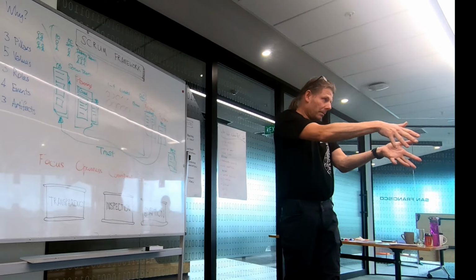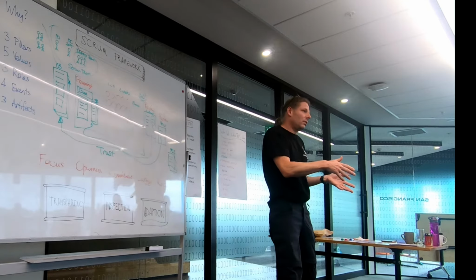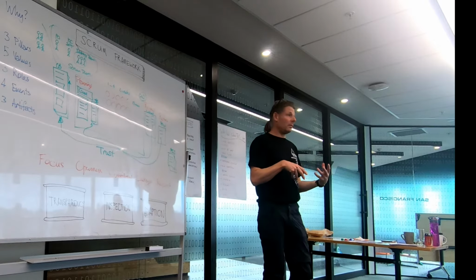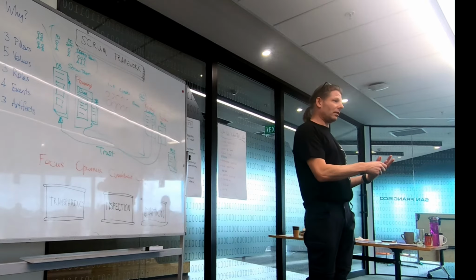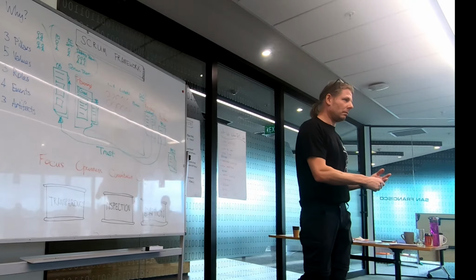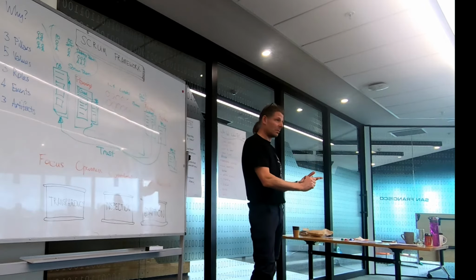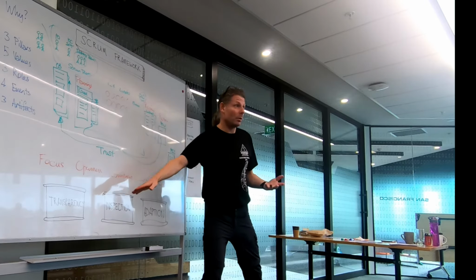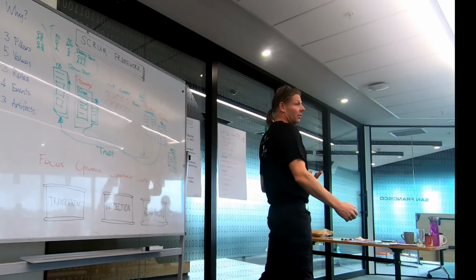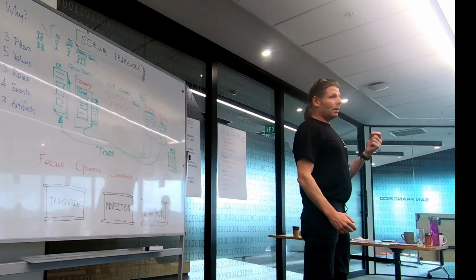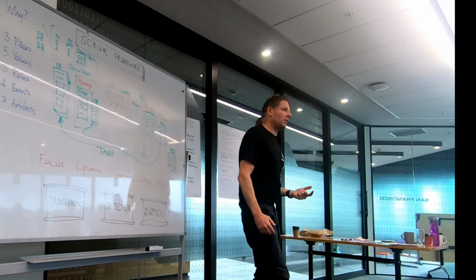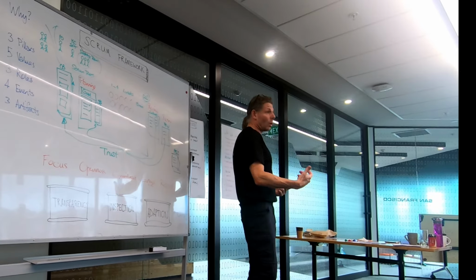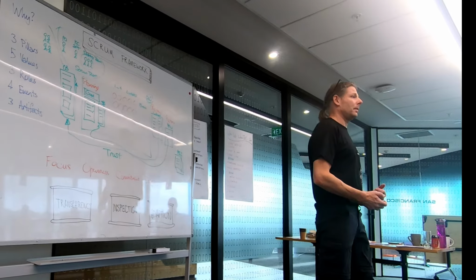That's the first part. The second part is the how, and this is really up to the team. The product owner can be around, but it's for you as a team to self-organize. And this is where you task it out and apply time to it. And the reason you do it is not as micromanagement. It's so that you have a measure, so you know every day when you inspect and adapt, are we progressing towards the goal? For a 2-week sprint, they would say typically it would be 4 hours for planning. So 2 hours in the what and 2 hours in the how.